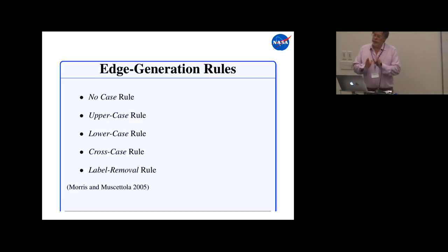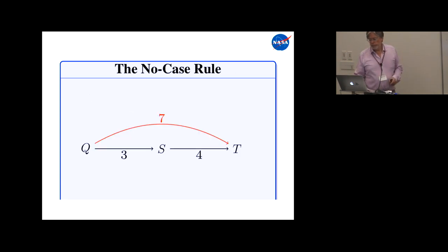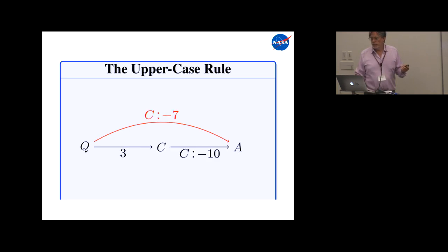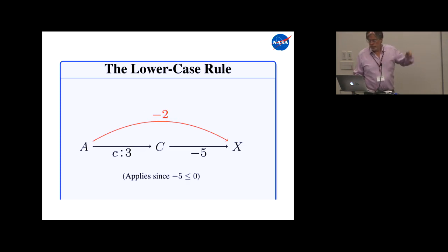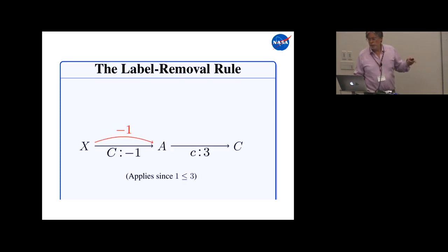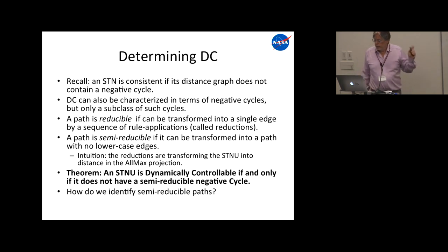what you do is, just like in the STN case, you translate this graph into a dispatchable form using these rules. And I won't go into these rules, but they're basically the same kinds of rules as we looked at in the all-pair shortest path algorithms, except some of them involve propagating weights, like this rule. If you have a weight and you have a relationship between A and Q, then you propagate the weights along. So these are examples of the rules that you apply in it. And then, let me,